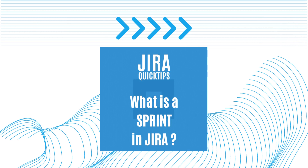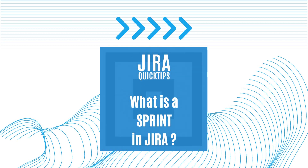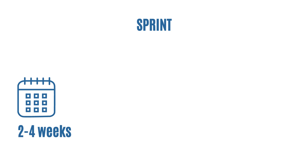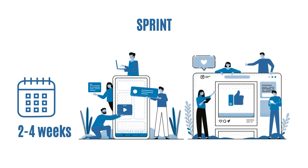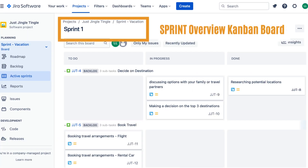Welcome to this quick tutorial about sprints in Jira. If you are new to software development, you may have heard the term sprint and wondered what it means. In Jira, a sprint is a short period of time, usually one to four weeks, where a team of developers works on a set of tasks or user stories to deliver a working increment of software. Think of it as a mini project with a specific goal that the team aims to achieve within the given timeframe.